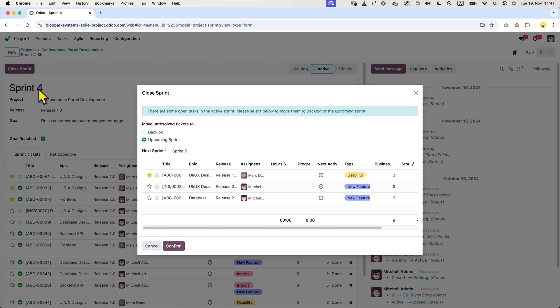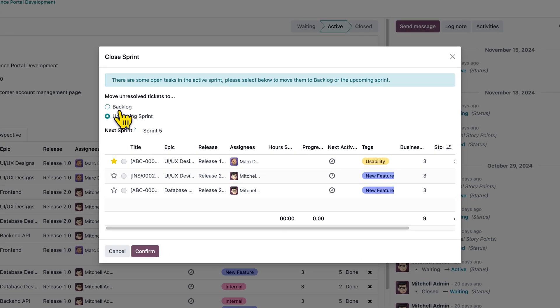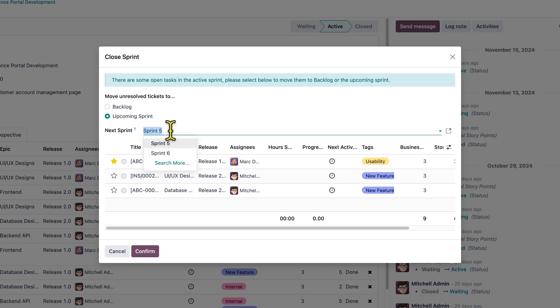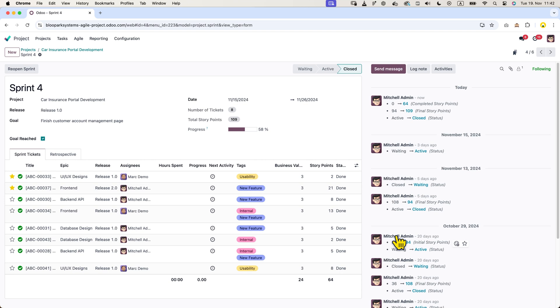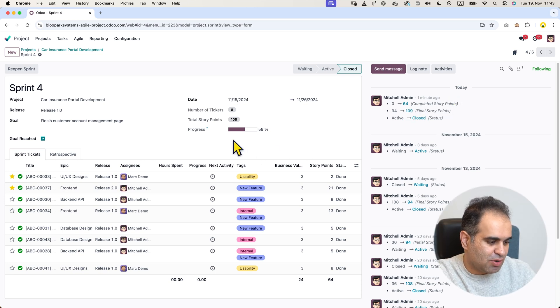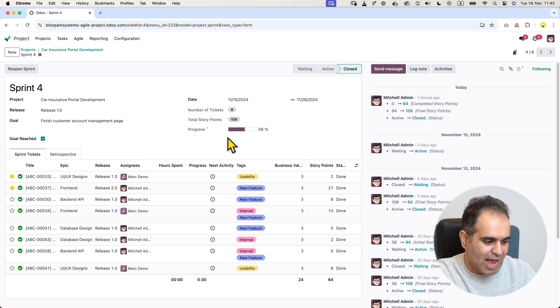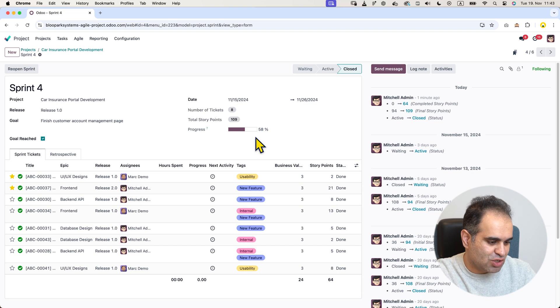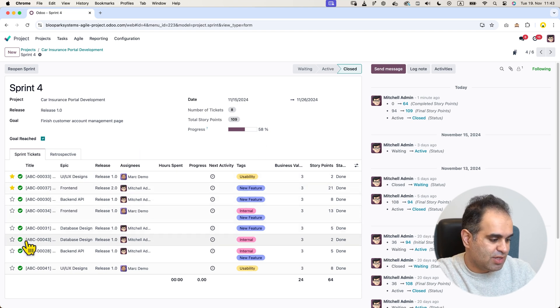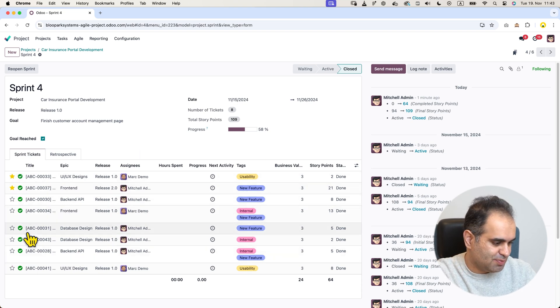If there are any incomplete tickets in this sprint, Udo will ask if we want to move them to the backlog or transfer them to the upcoming sprint, which is sprint number five. You can make your decision and confirm. Once confirmed, you will see the total velocity of the team for this sprint, which is 64. We can also see its status in the progress bar, as well as the completed stage for each of the tickets in this sprint.